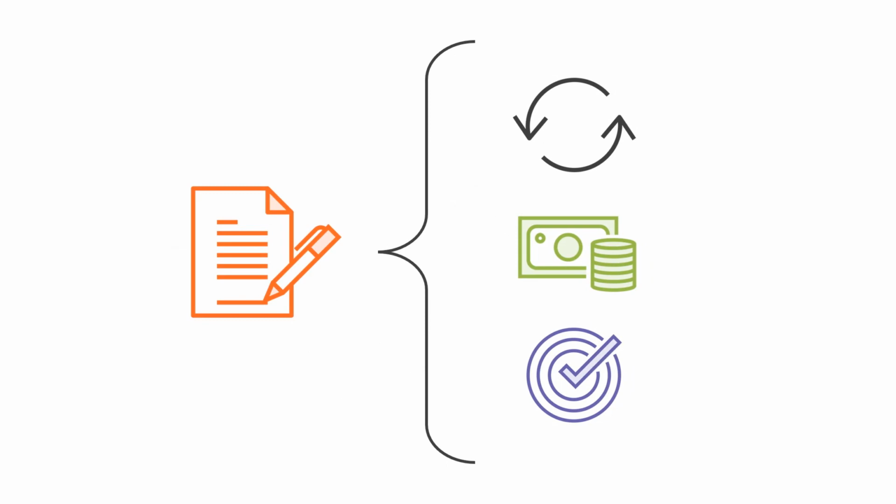I personally like the operational group to physically sign the document in some sort of formal ceremony, such as a release party or even at the end of the lessons learned meeting. Signing a document in front of a large group signifies progress, commitment, and ownership. In addition, you'll want them to sign because it's very difficult for someone to say afterwards that they weren't ready or were not properly prepared by the group who implemented the change.